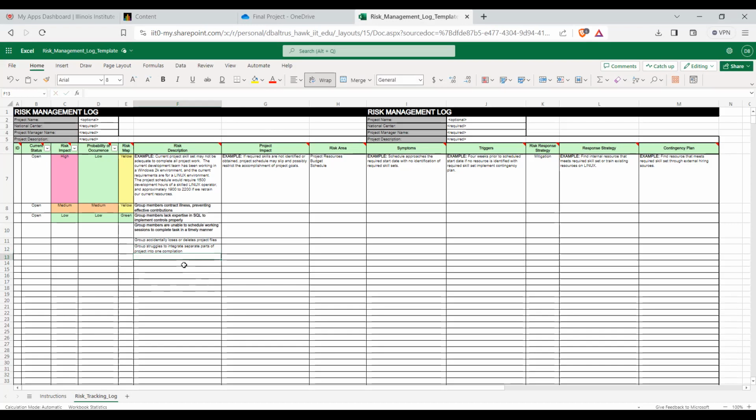Funding is not really an issue. No, but you guys will have to baseline everything. So you have the baseline costs. When you do the project schedule and we go to earned value management, you'll have to baseline your costs. So that could be an issue: over budget.